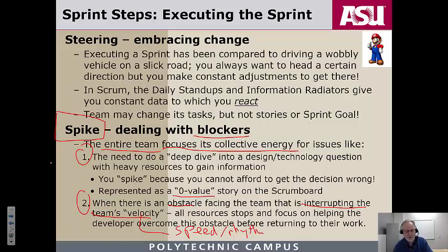options. Technically, if you decide that the sprint has already failed, that even though maybe you're 1 week into a 2 week sprint, the blocker is so significant that you're not going to be able to meet your obligations, you're still obligated to fail fast. So you're obligated to say, we're going to stop the sprint, we're going to replan, we're going to get back on track by basically setting up a whole new sprint and doing a reset. But of course, at that point, you got to bring in your stakeholders, you've got to bring in your product owner slash customer, and kind of go through that process again.